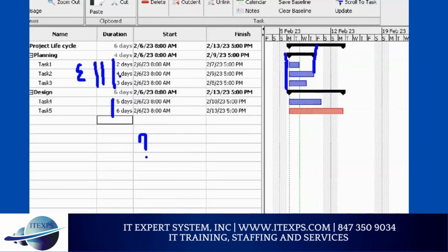So you can see I have a 4 day task, so the summary activity automatically calculates 4 days. Here, of 5 and 6, one task is bigger, so the summary activity is 6 days. Now this activity is summary and this activity is summary. Out of these, which is bigger? This one. So the master activity is 6 days. It automatically calculates the hours. Make sense? There is a lot to cover, but right now it's 8 o'clock, so we'll take a small break.